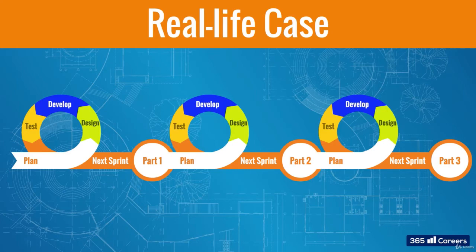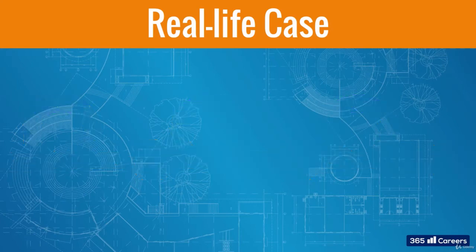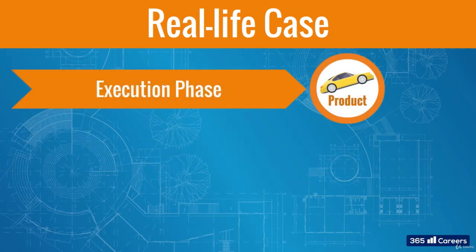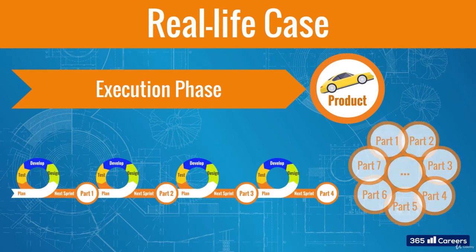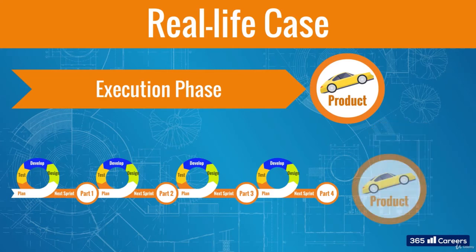And for certain products, such as software, this part may already be something that can be used by the organization, no matter what happens later in the project. With these types of projects, the product is gradually developed and reviewed multiple times during the demos. This also helps the team catch discrepancies early in the project, which reduces the risk of straying away from the actual needs of the customer with a single big bang execution phase.